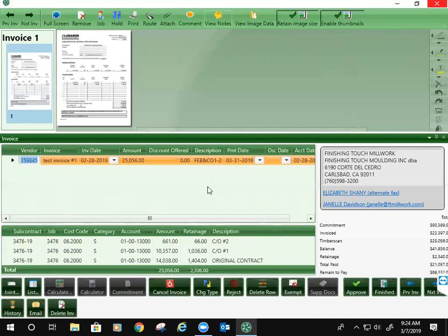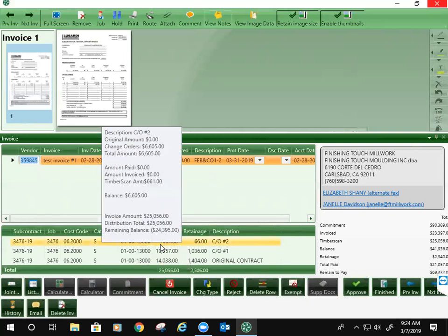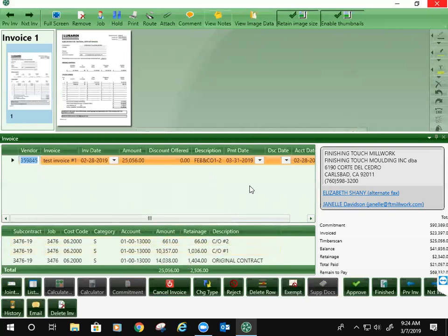One thing you have to keep in mind, gentlemen, is the amount on the top has to agree with the amount on the bottom. On the top, the header, you're getting a total. So if you go down and delete a value in one of the lines below, you'll also need to populate up so that our totals match. It's not going to let you move forward.